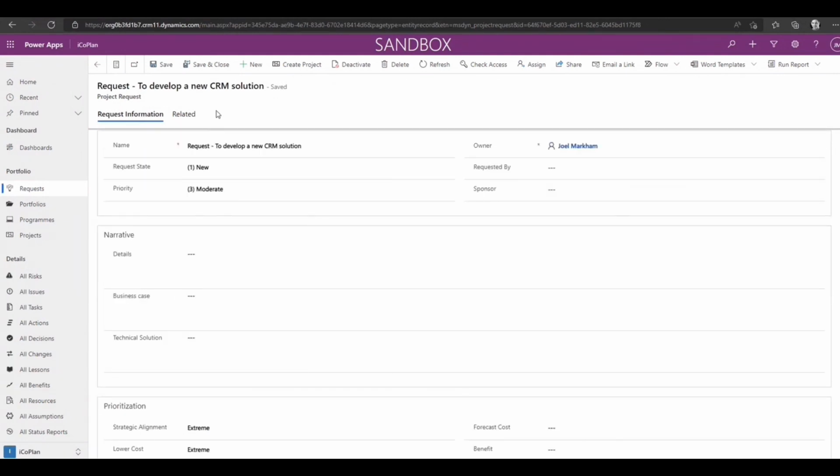And then, subject to you approving it in your demand meeting, I think we used to call them BGRs in Welsh Water, business generated requests. We'd have a BGR meeting every Tuesday morning at 8 or 9 o'clock, where we'd look through all the business generated requests and review them and say, is this a project? Is this not a project? Is this minor works? And so on. Then you can create the project from here, and it'll create it in the relevant project portfolio.